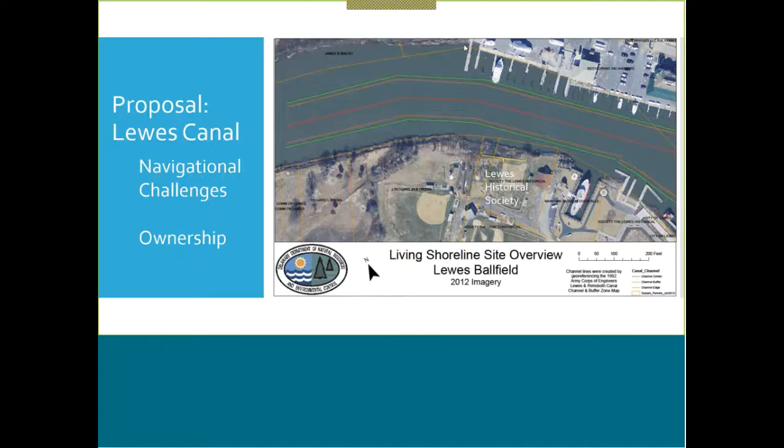We do have records of a state endangered four-spine stickleback. So we would recommend, if there was any in-water work and there was known submerged aquatic vegetation around the site, that we would ask for a spawning window, a time-of-year restriction from April 1st to May 30th. But it doesn't look like that's going to happen, so we would trust you guys to make that determination yourselves. But if you guys are staying in the high tide, or no in-water work is happening, all the work's going to be done during low tide on the mud flat, we don't have any concerns with this particular project. All right, thank you.